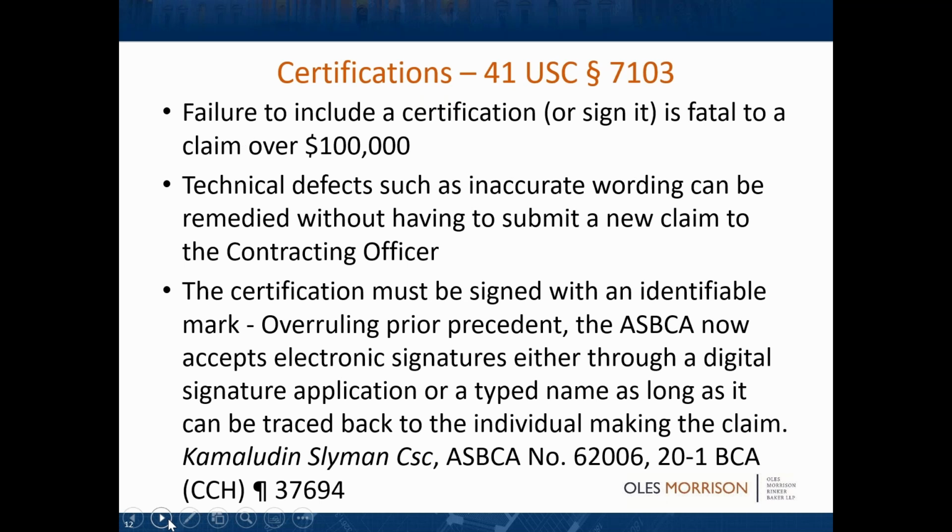Certifications, again, this shouldn't be an issue, but it still is. If you don't include a certification, then it's not a claim, okay? You are allowed to cure a certification that's not written correctly, but the certification has to be signed by an identifiable mark. Luckily, recently, the board has overruled its prior precedent, which essentially was that you had to sign it in pen and ink. And now, so long as it's a mark that can be traced back to the individual,